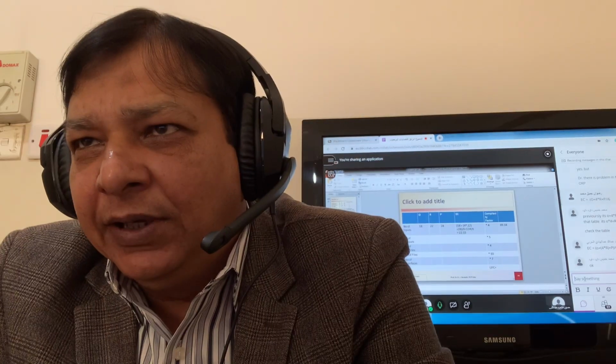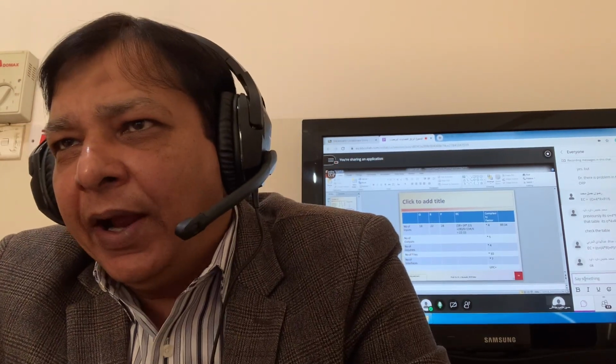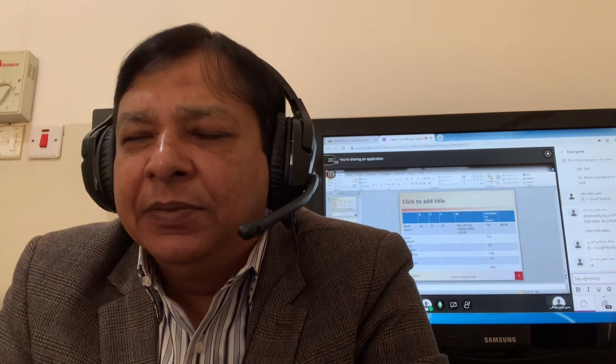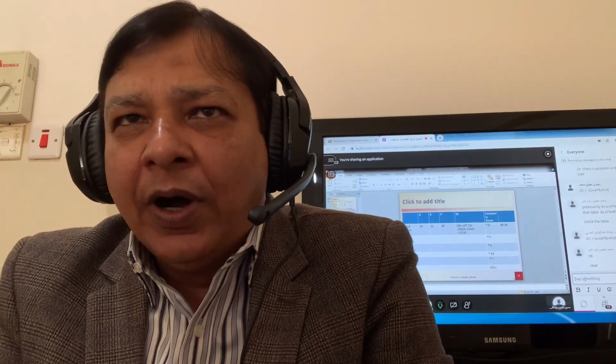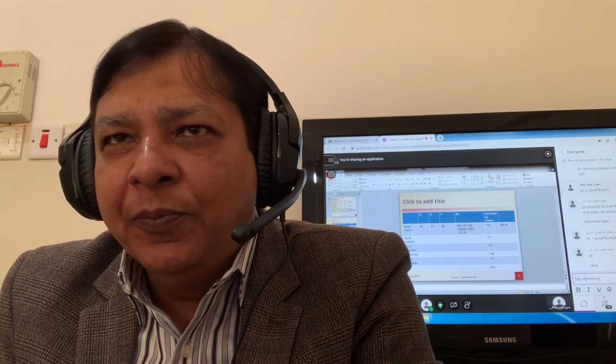In the case of inputs, 18, 22, 28. And then you have EC, and then you have the complexity factor. The last column, keep it empty. Realistic, multiply by 4, and then you add the optimistic, then add the pessimistic and divide by 6. I intentionally put double brackets to make it clear for you. Now, you calculate EC for number of inputs and then multiply with the complexity factor. So you have the value in front of inputs, 89.34.